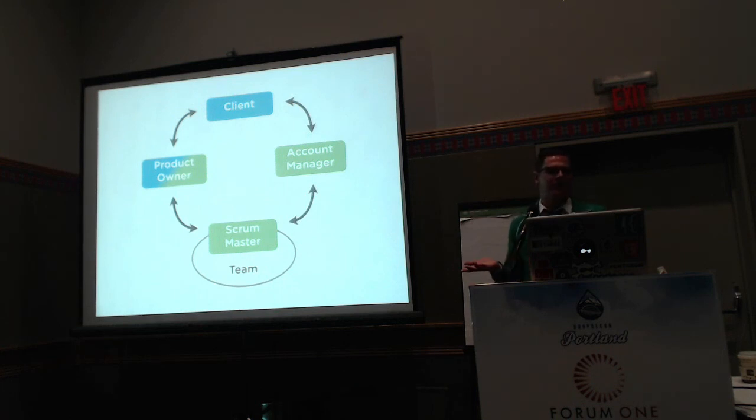But the fact is, I've never actually seen that happen well. So you really get kind of clumps of people. You get 1 person working on this story, and 2 people working on that story, and 3 people working on that. And then as they finish it, they'll move around organically from task to task. We don't split it up 1 person per story. It's whoever needs to be involved. So we're doing thin vertical slices as much as possible. And by that I mean, as a user, I need to visit the blog. So that means you have to make a content type, you have to theme it, you have to build in Twitter integration or commenting or something, so you have all these roles working on this one story. But there are, of course, on an hour-to-hour and day-to-day basis, work that only one person can do at any given time.